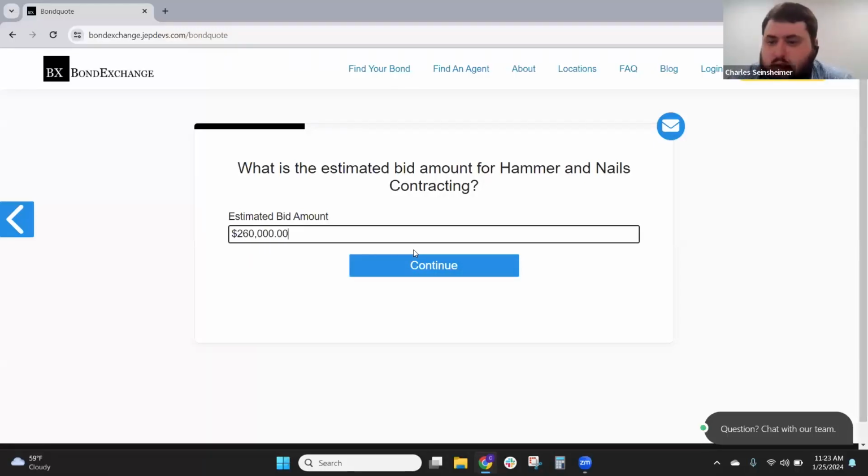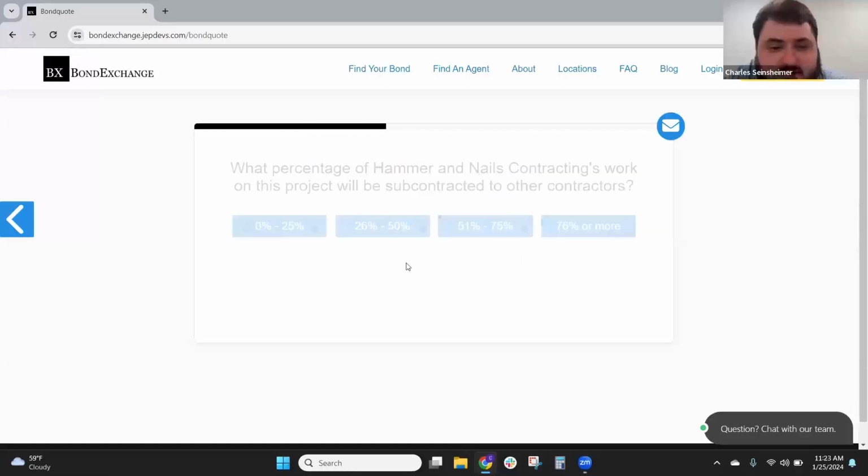So, they do their own estimates and they decide this is what they think the project's actually going to be worth. So that's what they're going to bid at. And if the other bidders think the same thing, it might be different than what the original estimate from the engineer was. But the price is found out by bidding. So we'll just say the bid ended at 260,000.